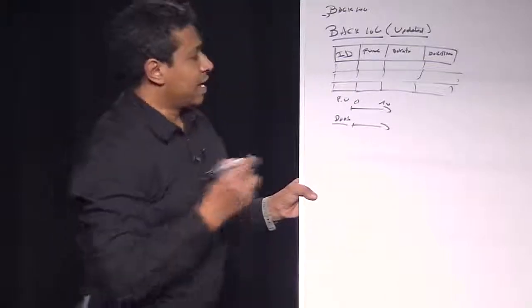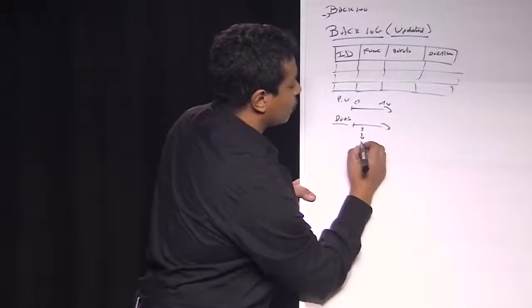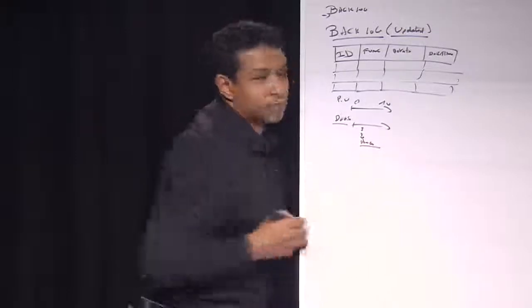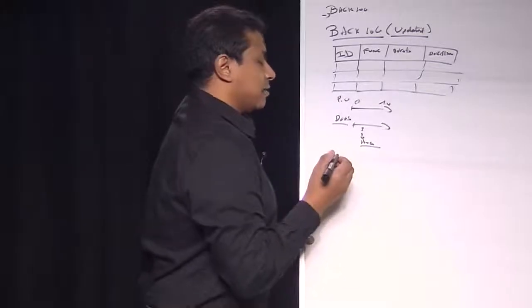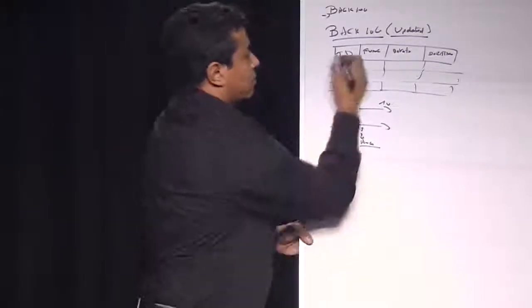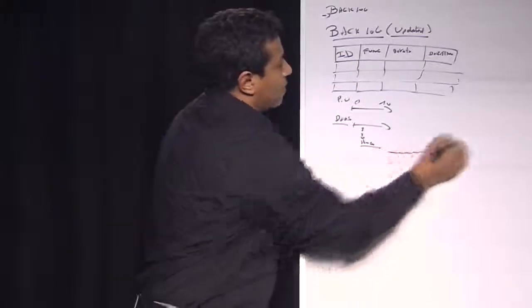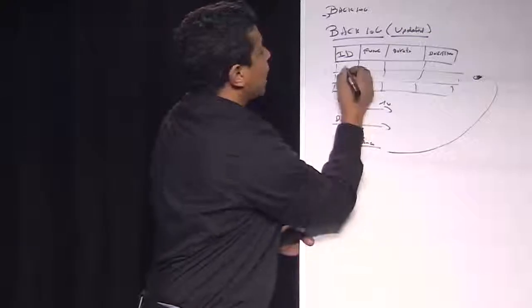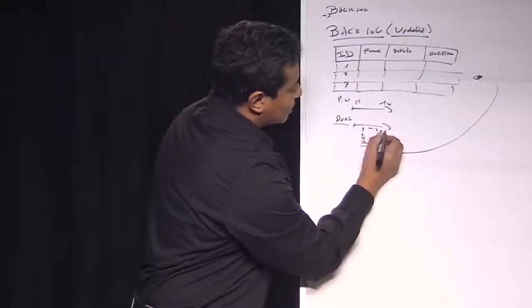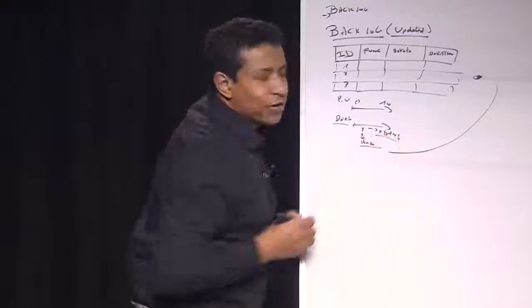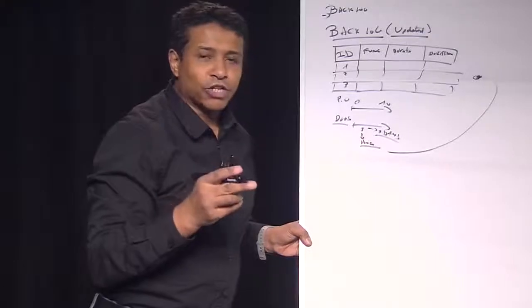So, let's say, as we've been saying before, about 3 days in I've got my review as a PO. I got my review, and I understand that I've made a mistake with my priority. I can put my backlog back and change my number of priority so that for the last 7 days it can be in order. This is one of the major points of Agile.